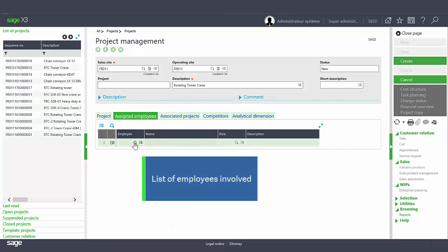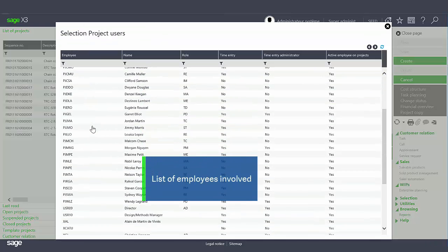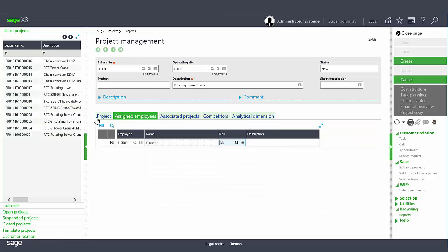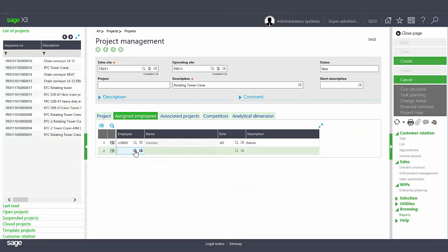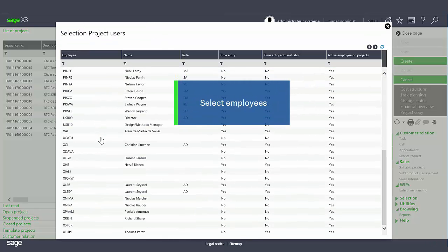On the assigned employee tab, you can list the employees that will be involved in this project and identify their roles. Later, this list will be used as a filter to assign employees on labor tasks.